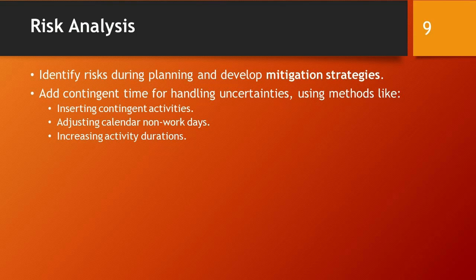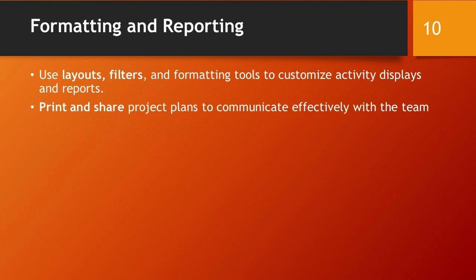Add contingent time for handling uncertainties using methods like inserting contingent activities, adjusting calendar non-work days, and increasing activity durations. Use layouts, filters, and formatting tools to customize activity displays and reports. Print and share project plans to communicate effectively with the team.